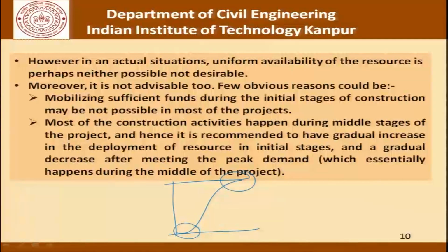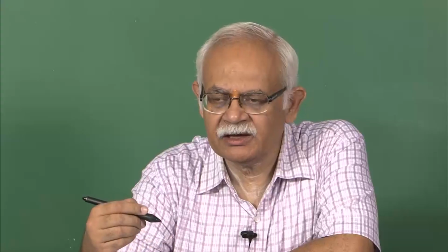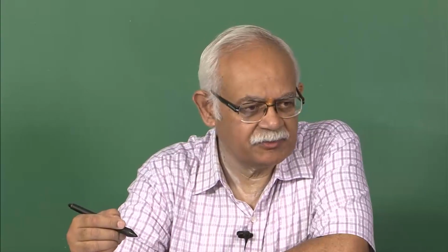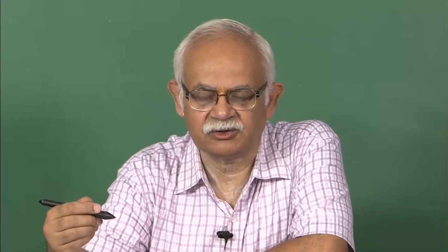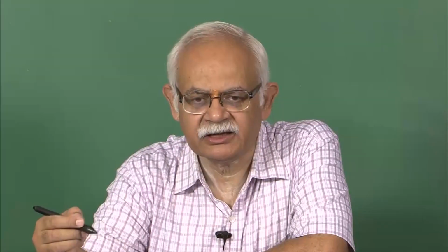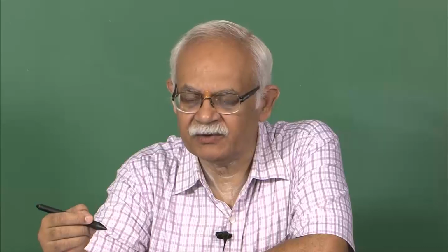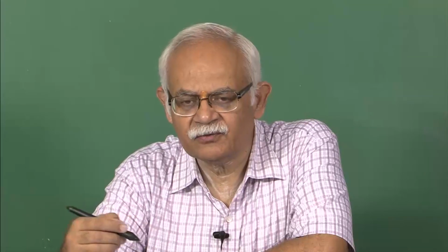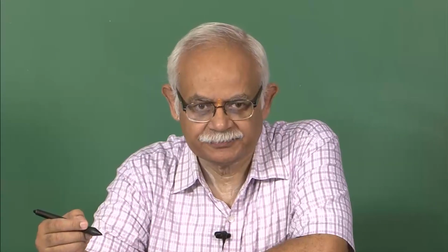Similarly, towards the end of the project, it is very difficult to have the entire workforce working at that project. There will be smaller and smaller areas which will be available, there will be smaller and smaller amounts of work which will be left, and therefore it makes no sense. It will be very difficult for a uniform progress to be maintained.